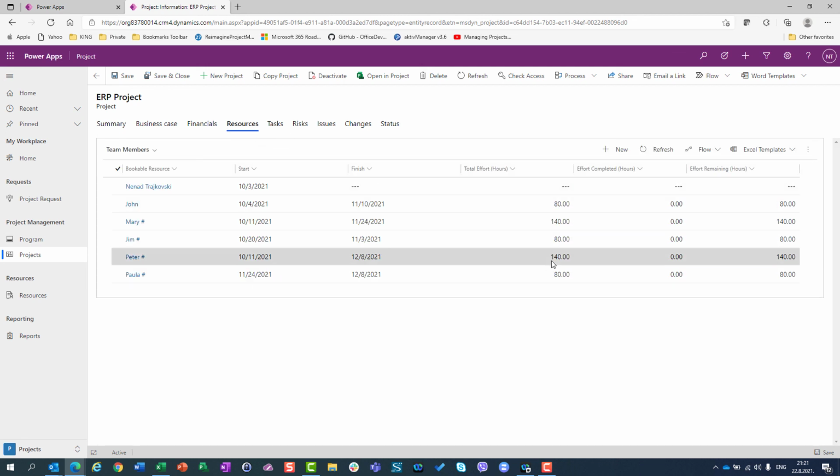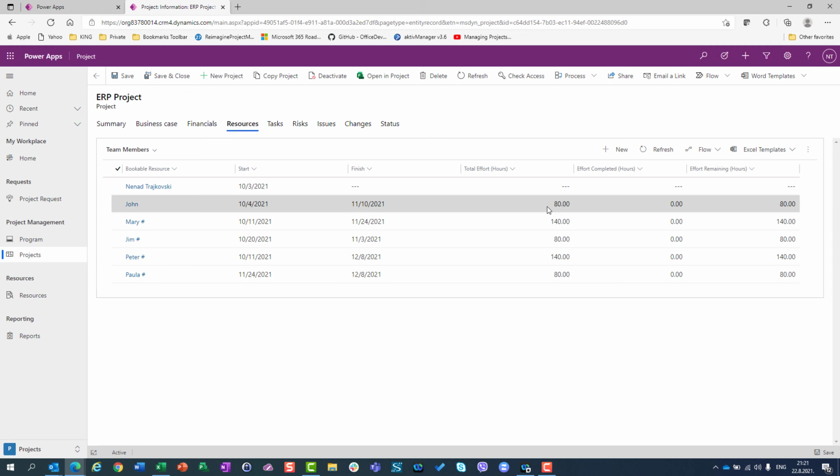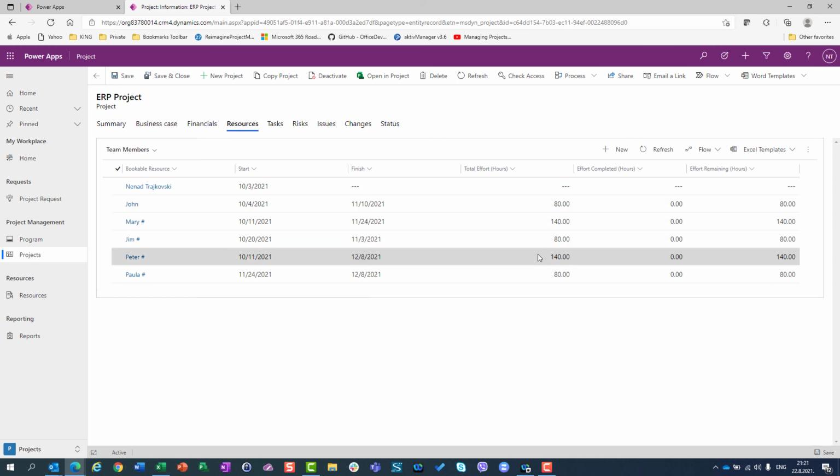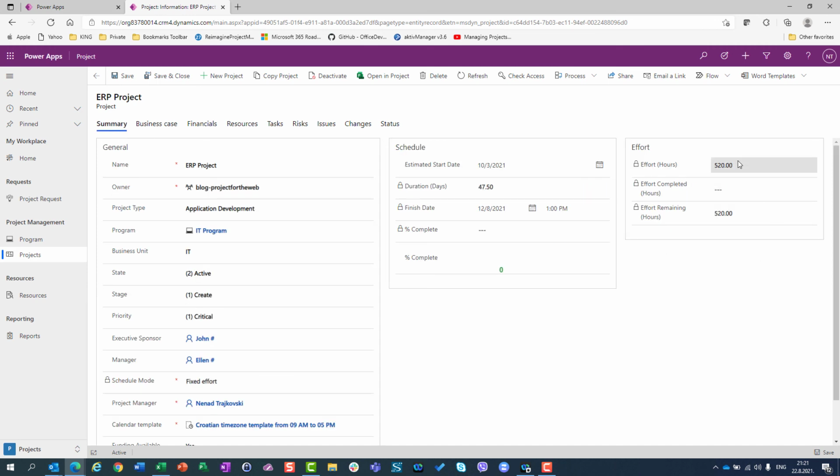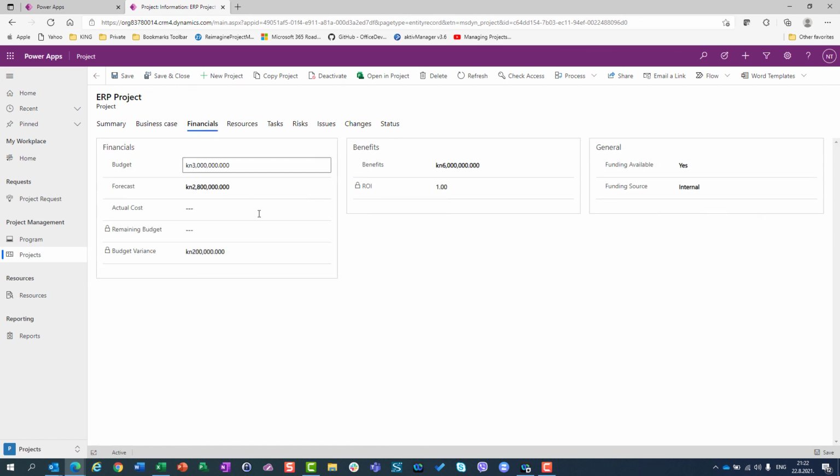So if you sum those fields, 80, 140, 80, 140, 80, you will see that in my summary task, I have effort 520 hours. Completed is 0. I will show you in some of my future videos how you can get the result here. And also I can see in financials that nothing was changed because actual cost is going to be filled in by myself, so manually.